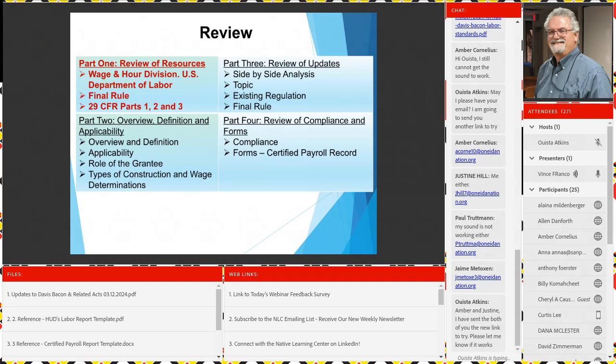And you do know, I hope you do know, that Davis-Bacon is the legislation. Davis-Bacon and Related Acts are just that. That's the law, the legislation that was put into effect back in the early 70s under the Nixon administration. It's changed a little bit over the years, not a whole lot. Under the Davis-Bacon legislation, there are a lot of different issues, but the one issue that we need to be aware of is the requirement for prevailing wage and certified payroll records.